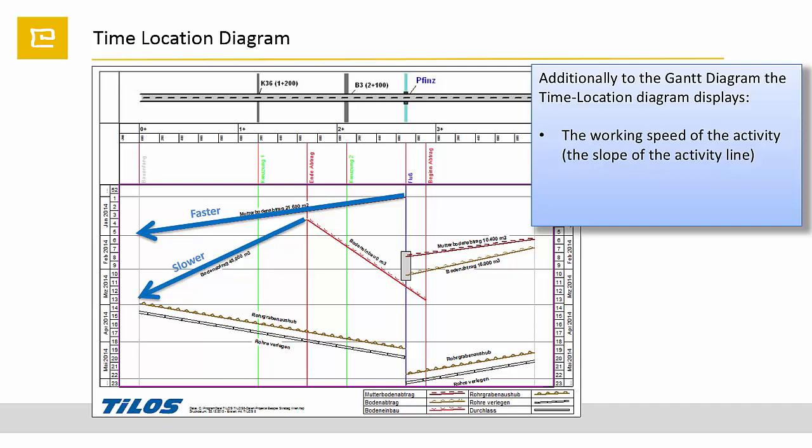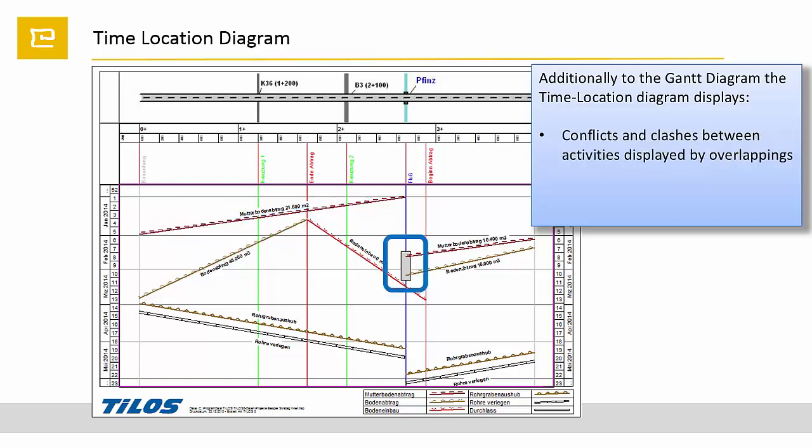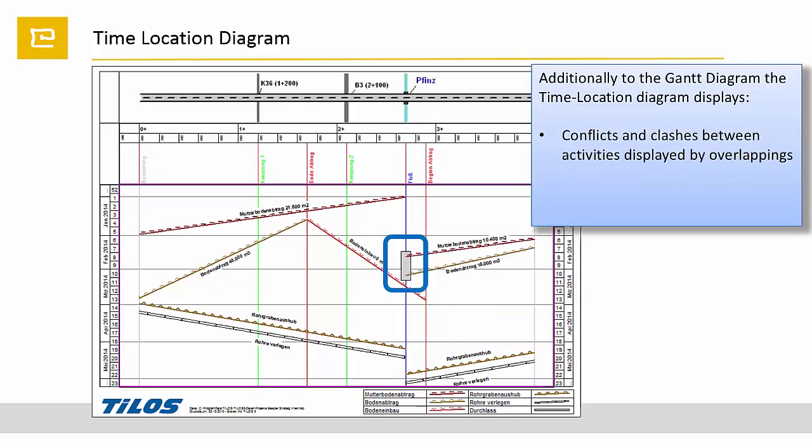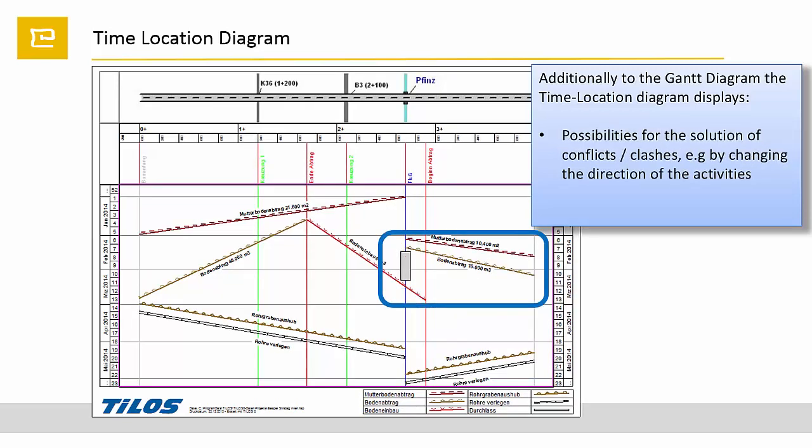Conflicts and clashes between activities get visible by overlapping of activities. Even possibilities for solving such conflicts are visible. In this case, just the direction of the two lines are changed to avoid the clash on the location on the rectangle activity.